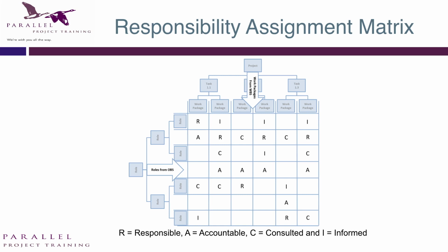So I may need to tell the equipment manufacturer what equipment I need to be delivered to the school to fit out. So it's called a RACI chart or role assignment matrix. Responsible, accountable, consulted and informed about the project. And we get it through marrying the work breakdown structure and mapping it across to the organisational breakdown structure.